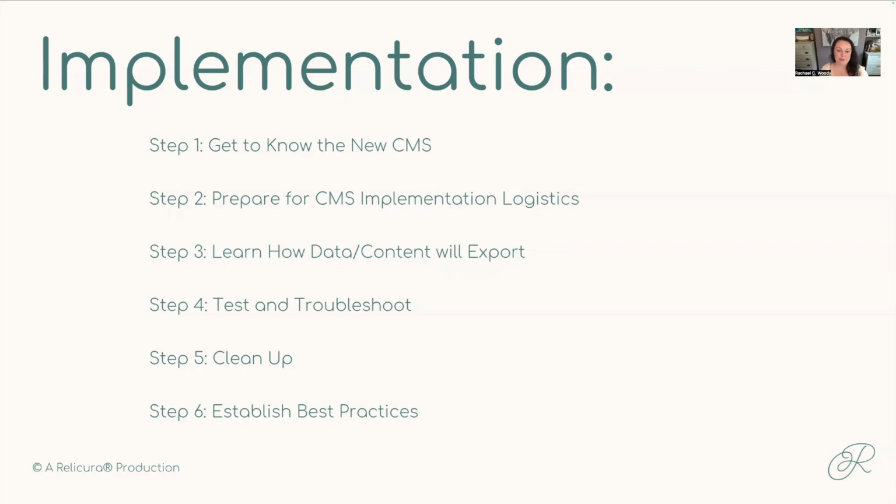Step 2, prepare for CMS implementation logistics. This can encompass where the digital files need to be migrated to so that they can be accessed by the new system. This could be setting up single sign-on, security and verification for staff to log into the new system, things like that.